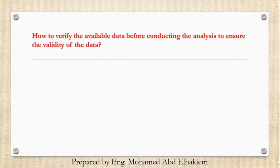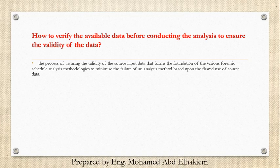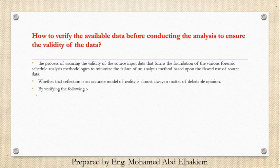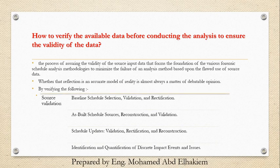How to verify the available data before conducting the analysis to ensure the validity of the data? The process of assuring the validity of the source input data forms the foundation of the various forensic schedule analysis methodologies, to minimize the failure of an analysis method based upon the flawed use of source data. Whether that reflection is an accurate model of reality is almost always a matter of debatable opinion. Verification includes: Source Validation, Baseline Schedule Selection Validation and Rectification, As-built Schedule Sources Reconstruction and Validation, Schedule Updates Validation, Rectification and Reconstruction, and Identification and Quantification of Discrete Impact Events and Issues.